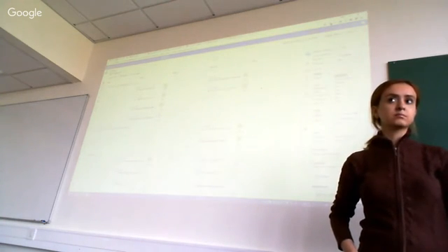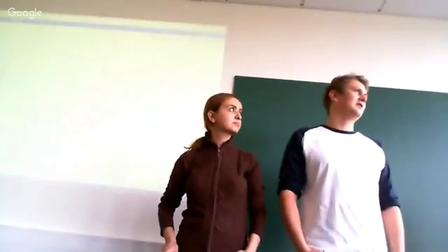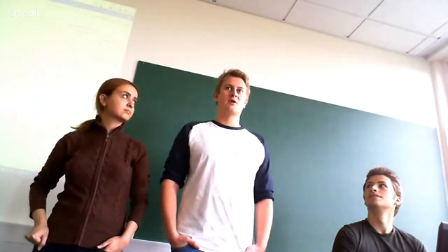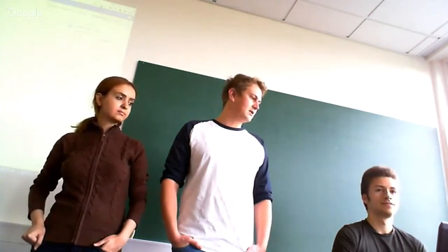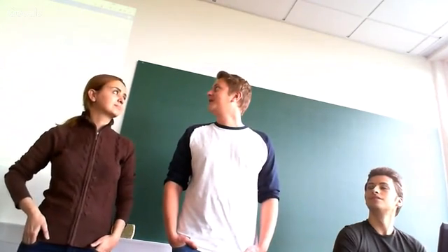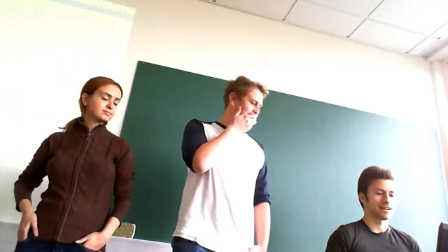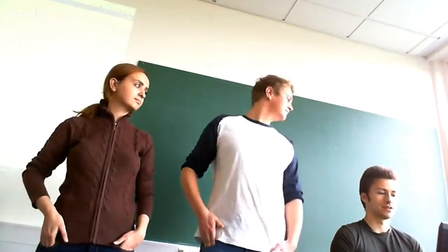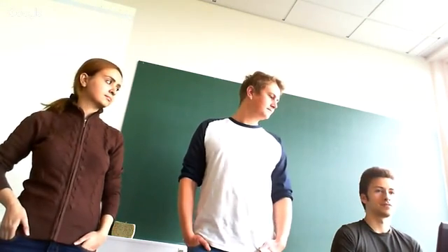Any lessons from the previous sprint? What you have done? I think for the next sprint, we have to start right away. We're having a meeting after this seminar, and we'll try to create all the issues from the start and really think hard about what we hope to accomplish in the next sprint. And we'll have to try to get estimates on the time the issues will take better than last time, since last time we created some issues during sprint 2, and that should perhaps have been thought about in the start before it actually started.